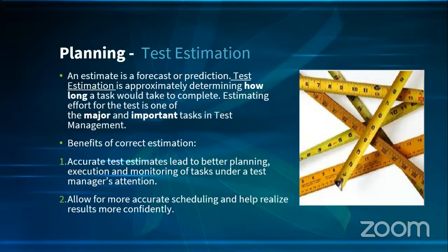So the benefit of this is that accurate test estimation leads to better planning, execution, and monitoring of tasks under a test manager's attention. The test manager, the clarity you can give to the business is to say, we have written 1,000 test cases. At this moment, this is what we have done because these are the functionalities that have been delivered. We have executed 400 of them, which means 40% have been executed.